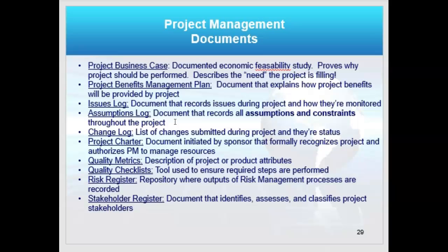Whenever I do integrated change control, I want to keep a change log, a list of changes, both submitted, denied, and approved, etc., and the documents that went with them. The project charter is high level, and it's initiated by the sponsor, and you are going to work on it, and the sponsor is going to sign it.